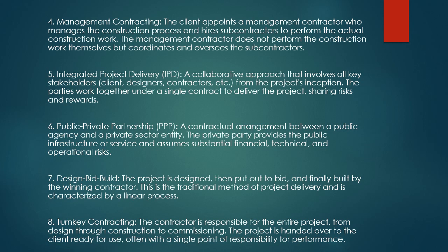Number 6, public-private partnership (PPP), a contractual arrangement between a public agency and a private sector entity. The private party provides the public infrastructure or service and assumes substantial financial, technical, and operational risks.